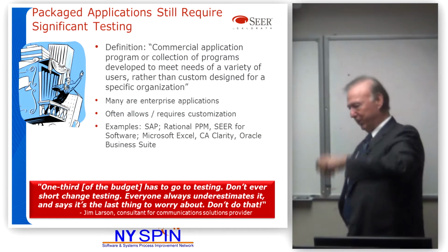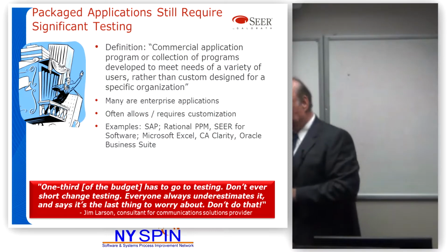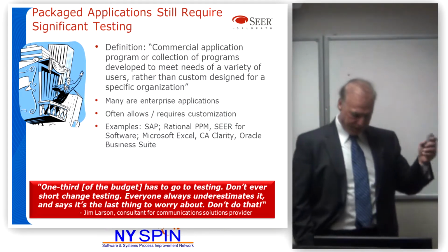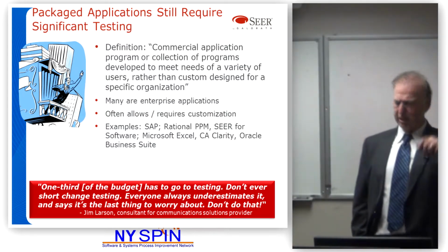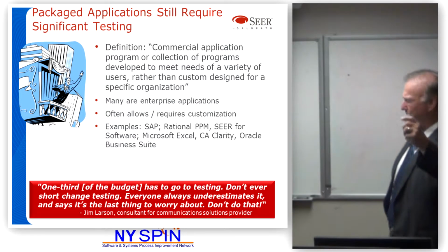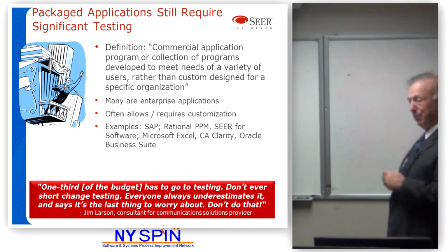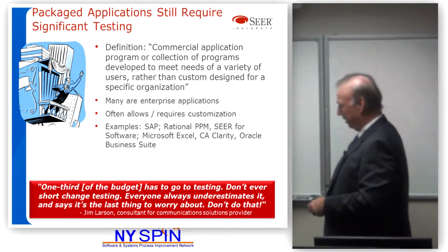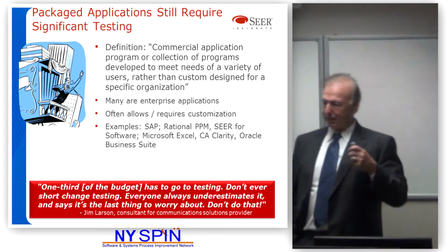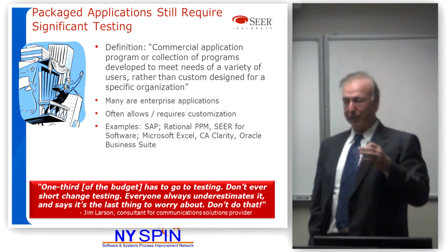Oh, we'll just use off-the-shelf. Remember earlier I said maybe you should have gone off-the-shelf? We'll just use off-the-shelf software. We'll get rid of healthcare.gov, use off-the-shelf. There were a whole bunch of different systems. California had one, a number of other people had one. Even then, you've got to test them, and that's a huge part of the budget, about a third of the effort, just to test them and make sure they do what they should, and more importantly, don't do what they shouldn't.